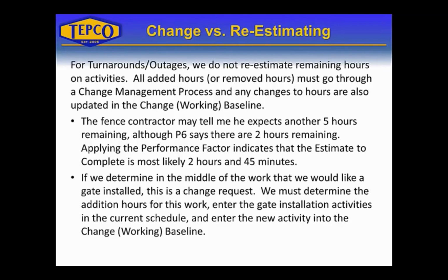If I come to the contractor in the middle of the work and say, whoa, I need a gate installed on this fence, that is a change request. So we must determine what the additional hours are for that work, enter a gate installation activity into the current schedule with the added hours, and enter that new activity into the change or working baseline as well, so that we can earn against that activity.